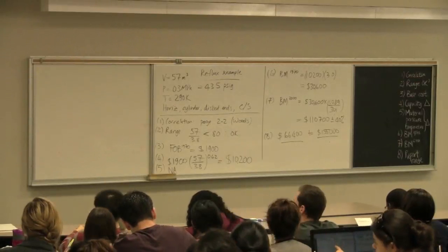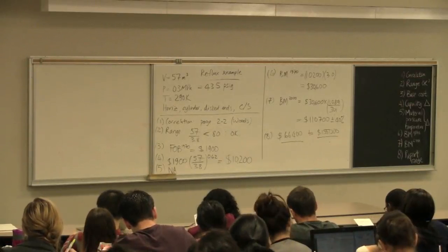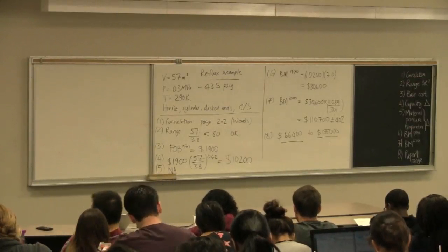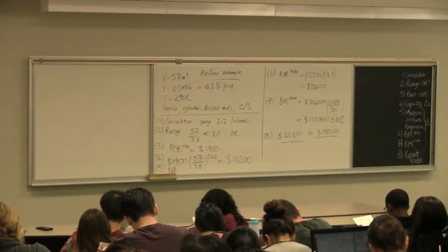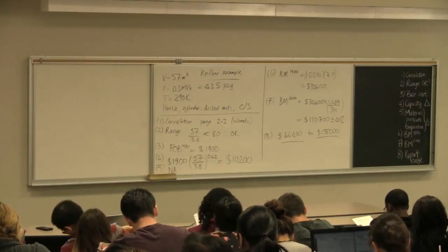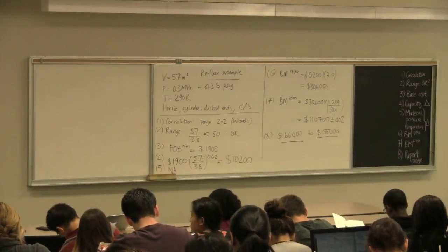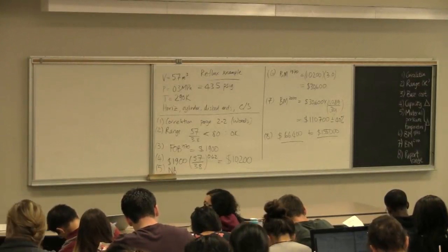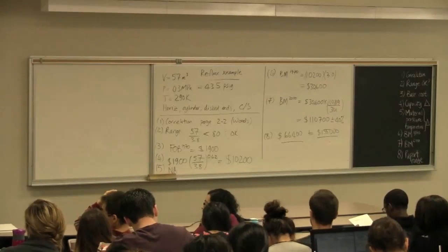Sir, how do you account for technology change over the last 30 years? Right, so that is one limitation of these indexes and this whole approach, that there have clearly been some major technology increments over the time, but that's not taken into account. But you could argue for these sorts of vessels, the technology cost would be only on the instrumentation side, which would be a small fraction of that. It's a small component in the bare module factor.